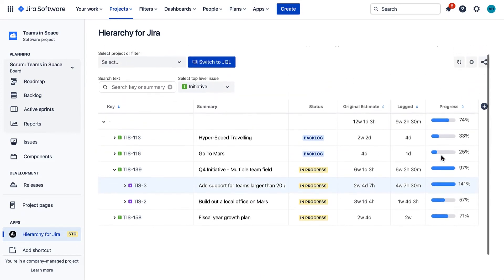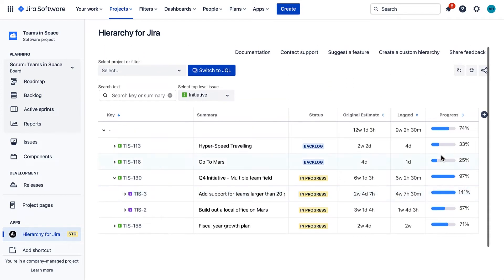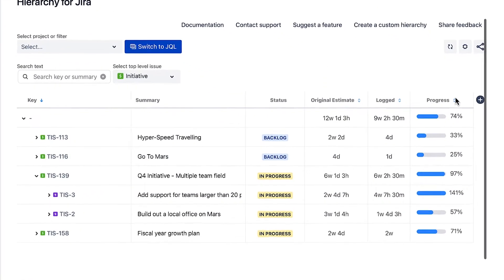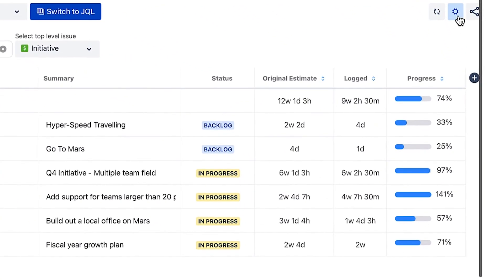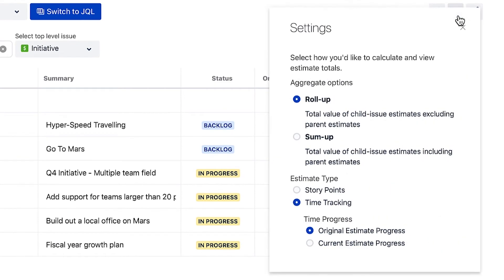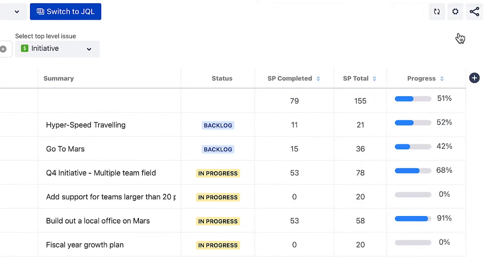For teams using story points to estimate work, simply switch the estimates type in the settings. Instead of the estimated time, the app will now use story points to report on your team's progress. You could for example use this information to estimate how many sprints your team will require to complete an initiative.